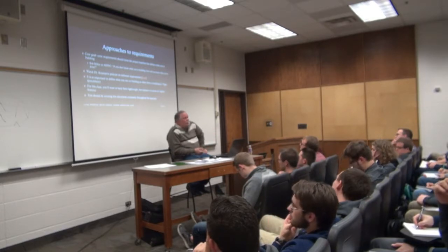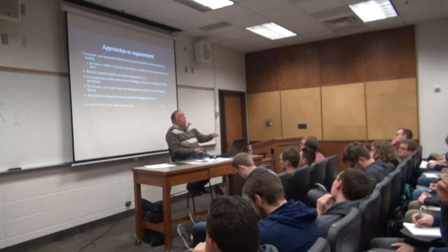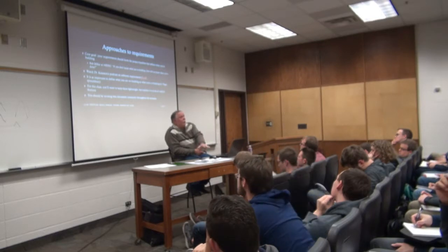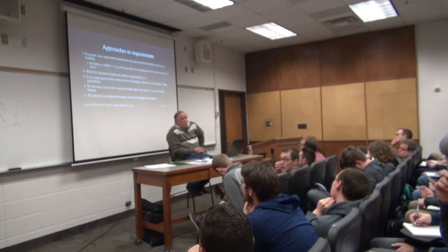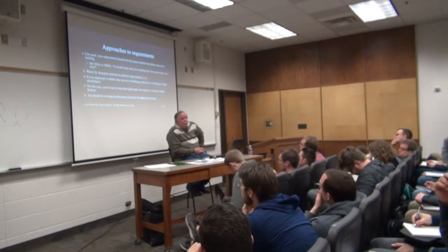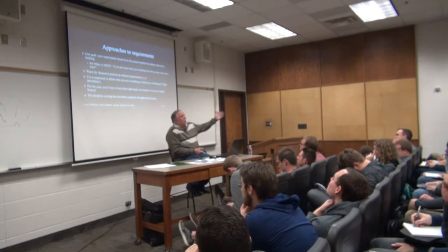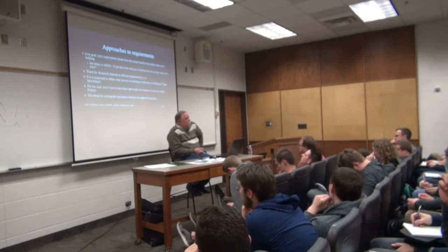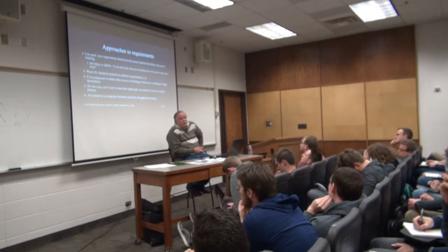And he finally said, if you don't know what you're building, how will you know when you're done? And he said, I'm going to ask for this every week when I come back, and I won't be happy until you have a couple of binders sitting here on this table that describe exactly what you're building. For this next release, it was a dot release. This is a multi-year project. And within 4 weeks, he got those binders. He held their feet to the fire and made them specify.